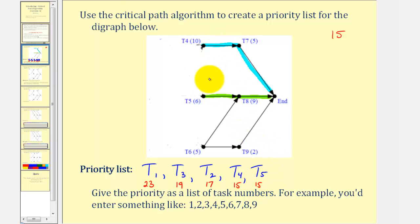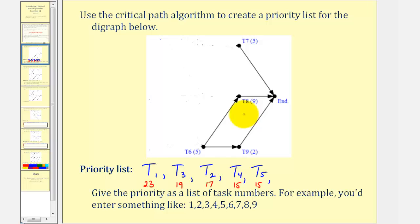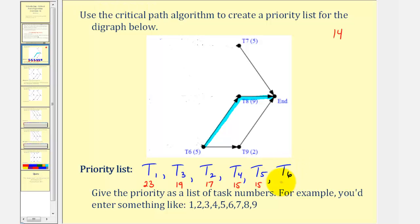Now we eliminate both task four and five from the digraph and find the critical path again. The path from seven to the end only has five hours, so it makes sense that the critical path starts at task six, which takes five hours as well. From task six to eight to the end has a total time of fourteen hours — there's no other path longer. From six to nine to the end only takes seven hours. So we add task six to the priority list with a path of fourteen hours.